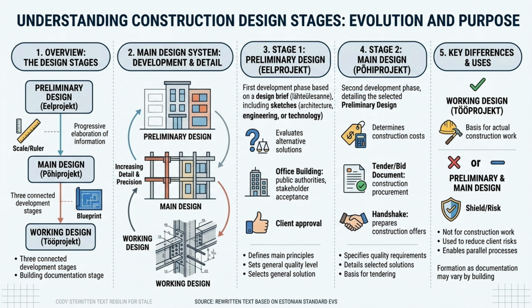After approval, the project moves into the main design stage of e-õppevara. Here, the initial solutions from the preliminary design are detailed further. This stage provides the necessary information to estimate construction cost and creates the main documentation for construction tenders or bids. This main design ensures all chosen solutions are specific and have sufficient detail and quality for contractors to prepare accurate construction offers. The outcome of this phase is a comprehensive set of documentation used for procurement and cost determination.